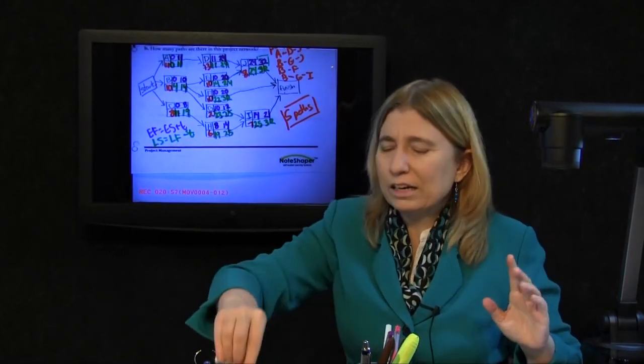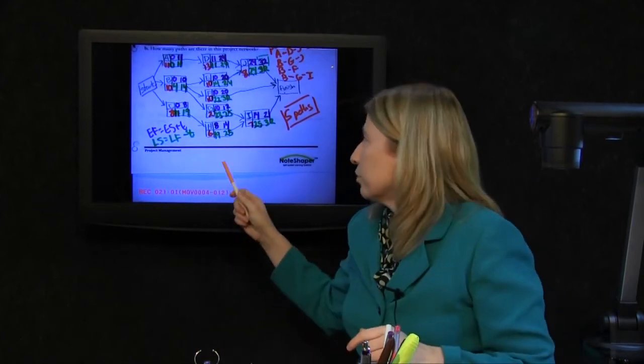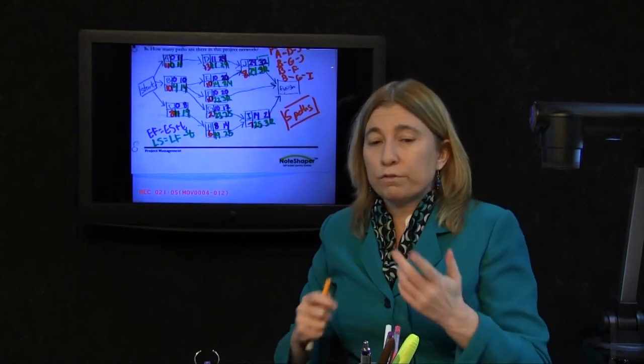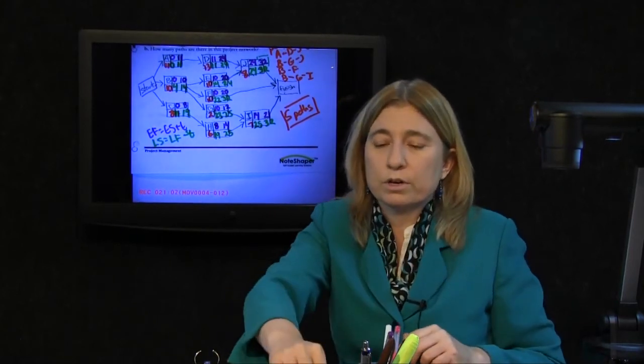So with B, you could start right now if you wanted. That's its early start time, or you could wait as late as 4 days from now. And that shouldn't be problematic theoretically. It wouldn't create any delays. Now, why did we do this? Well, for that one question, it asked for the critical path.